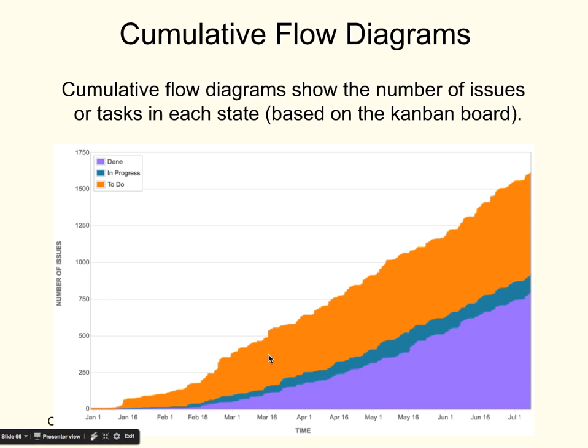And then, of course, the to-do list can get bigger because you end up with new requirements, you end up with bugs, things like that. But then also the done list gets bigger. And so you have this stacked graph here that shows you where you are and what's happening here. The idea is this part's supposed to get smaller as this one gets larger. So eventually that will happen. But this is a chart that's typically used in systems that are using lean software development.